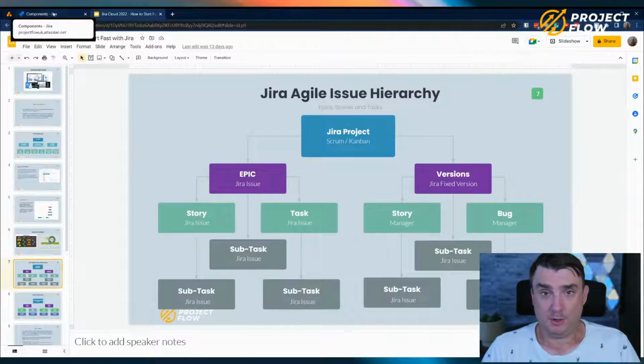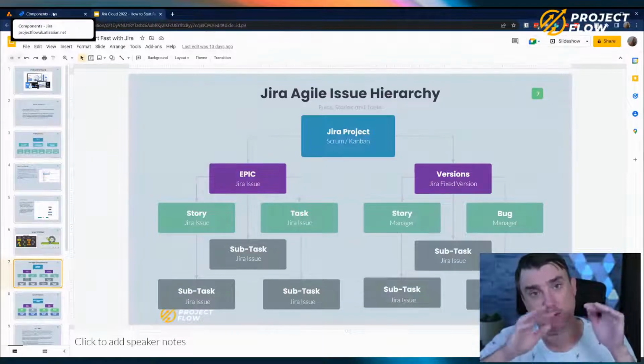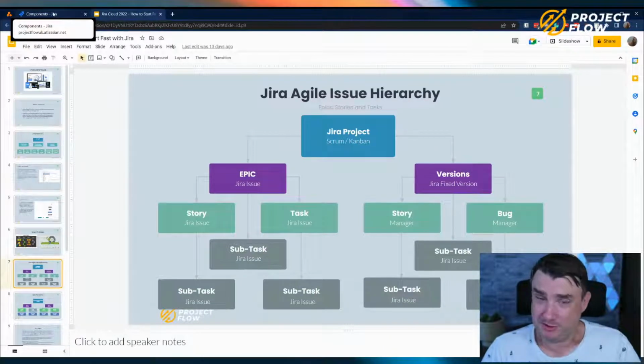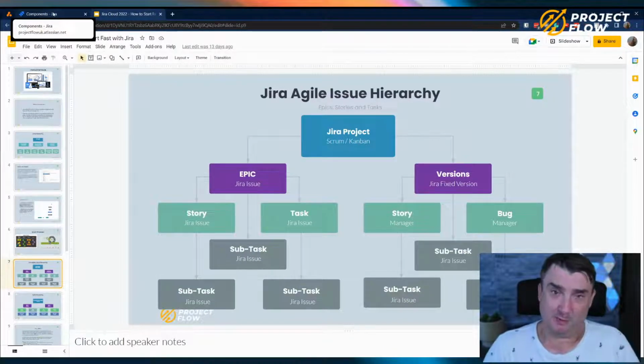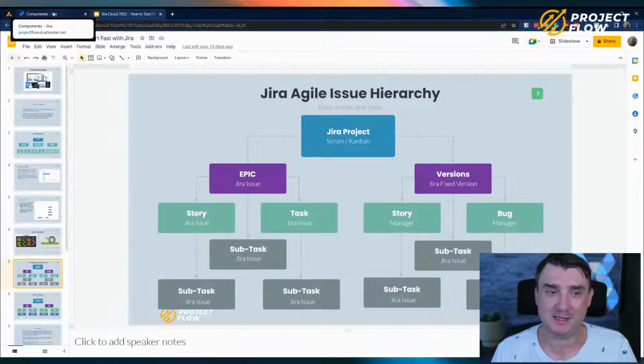And why will I be using components instead of custom fields? It's because, for example, if I would like to have a smaller piece of the project, and maybe that little piece could have its own lead. So using components, it's kind of impossible with custom fields because maybe you can just have 2-3 of them, and of course you can configure it, but why? Why, if you already have Jira components?